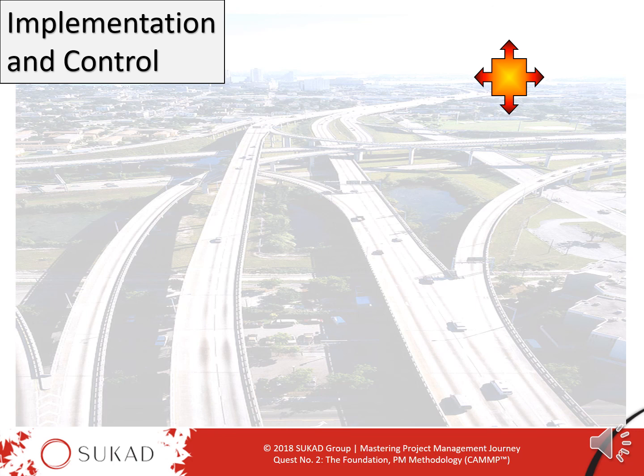And then we need to go back to the decision maker who has the power to approve a change like this. And we tell them, this is a request for change. This is the impact. What to do? If they reject the change, you continue with the original plan. If they approve the change, you have to come back and modify your plan to accommodate the change, and you continue on your journey. And hopefully, regardless of what happened on this journey, at least it was successful and you've had a good time and you've enjoyed yourself.